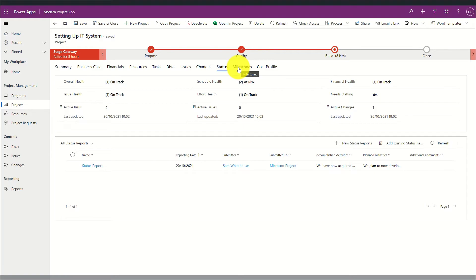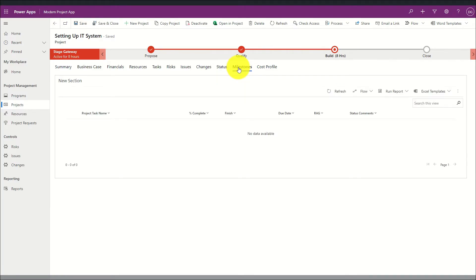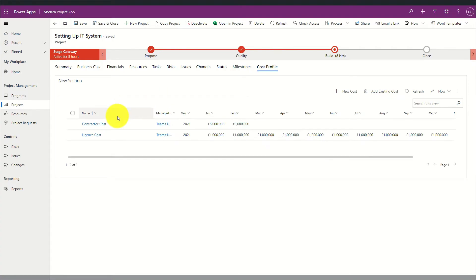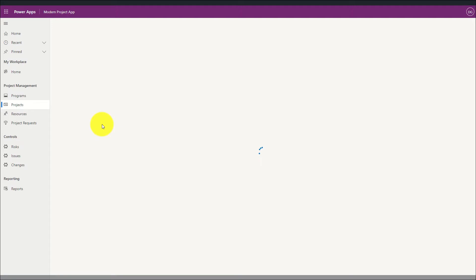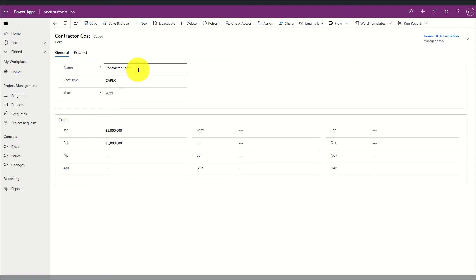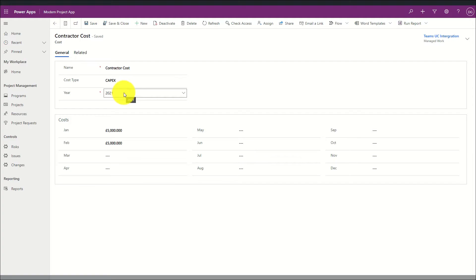In addition, I've defined a custom milestones table where key project milestones can be identified, captured, and tracked by the project manager to ensure they are on track. Finally there is a cost profile tab which allows me to define custom CapEx and OpEx costs and define a breakdown by year and month-by-month spending. Opening a financial record shows a summary of the finance cost type, the year the finance was undertaken, and a breakdown of the costs by month.